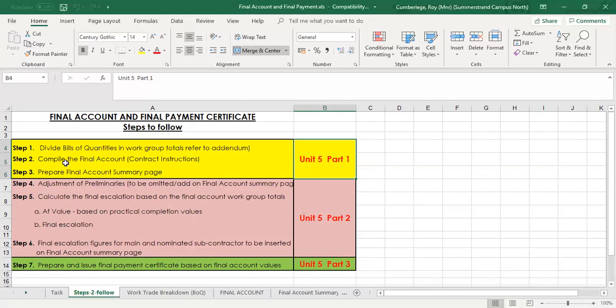You still need to negotiate with the contractor, but you allow something in the final account where you're going to issue payment certificates based on those estimated figures. Obviously, in this case, it will be our final account, not a draft, where the contractor and the employer will then sign the final account in agreement.